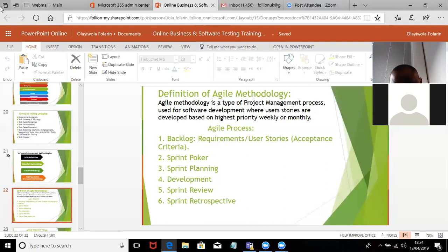Do you understand it now? Yeah. Okay. Now, sprint planning is to decide what the application is going to do in the following week or in the following sprint coming up. Usually, a sprint normally takes 2 weeks, depending on the organization, 2 weeks or one month. But the most common one is 2 weeks. And most agile teams, plus or minus, should not be more than 7.